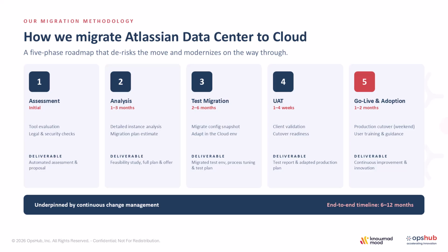You start with an assessment. You have some accelerators. I will name a little bit in this assessment, because some shops are so big that you really need technology just to do the assessment. It's not something that you just go reviewing yourself or doing interviews with. You need technology to review the situation where you are starting from. Then you have to analyze what you find, all the problems, or all the needs, all the data you have to take out, all the workflows you have to review.